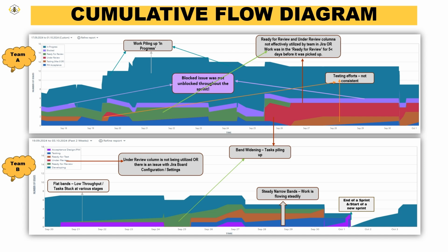Whether you are a product owner, a Scrum Master, a project manager, or a tech lead, understanding the CFD will enhance your ability to manage work, make data-driven decisions, and improve team productivity. A CFD is a visual representation of your workflow over time. It tracks the number of tasks in different stages, such as to do, in progress, in review, PO acceptance, and done.